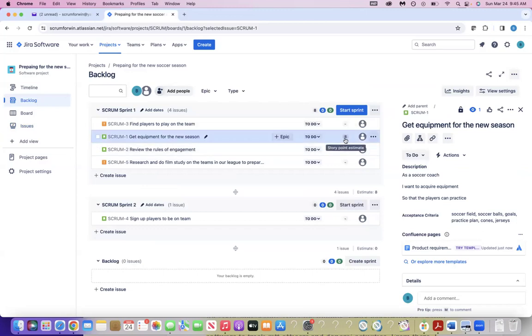So quickly to chime in on what you're saying before you move on to the next thing. As an organization and as a Scrum Master, or when you're working in your organizations, that is definitely one thing you want to drive home. Another Scrum team might be committing to 50 story points and completing 49 per sprint. Your team is committing to 20 and completing 18 per sprint. You can't compare those metrics because estimates and story points are unique to teams and the situations they're dealing with. So that is not a measure of one team against another, and it should never be used as one.